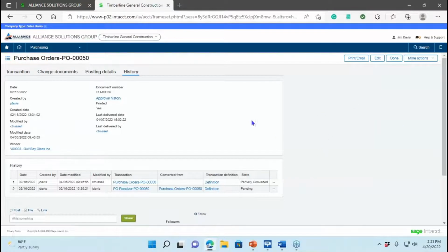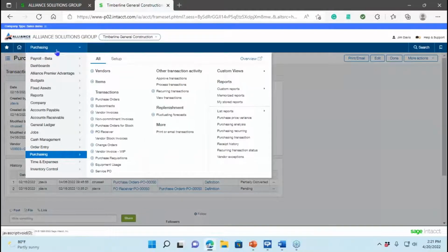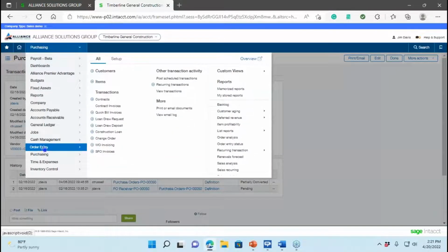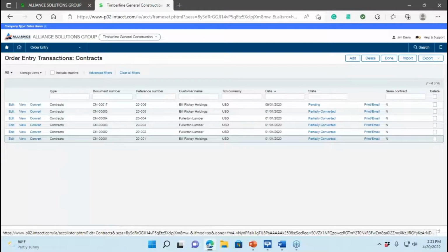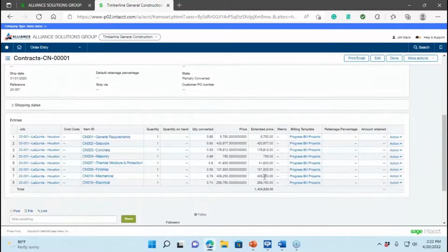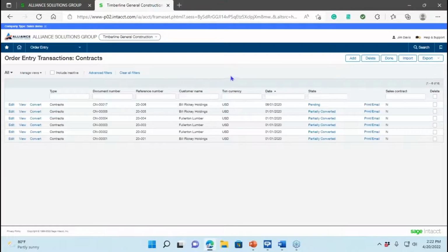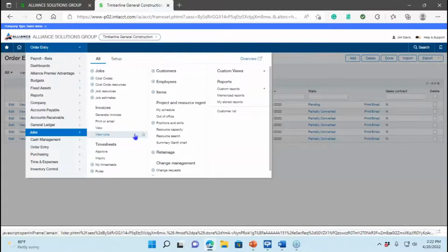Moving along a little bit and just showing you kind of what's in the software today compared to next month when we get the new contracts and billing module. We do have the ability to come in and set up a contract, like a schedule of values right now. It is going to change, but I still want to show it to you. So within the system, I could go in and I could set up that schedule of values. And I do have the ability not to create the AIA, but I do have the ability to get that invoice into the system and mirror the AIA today.